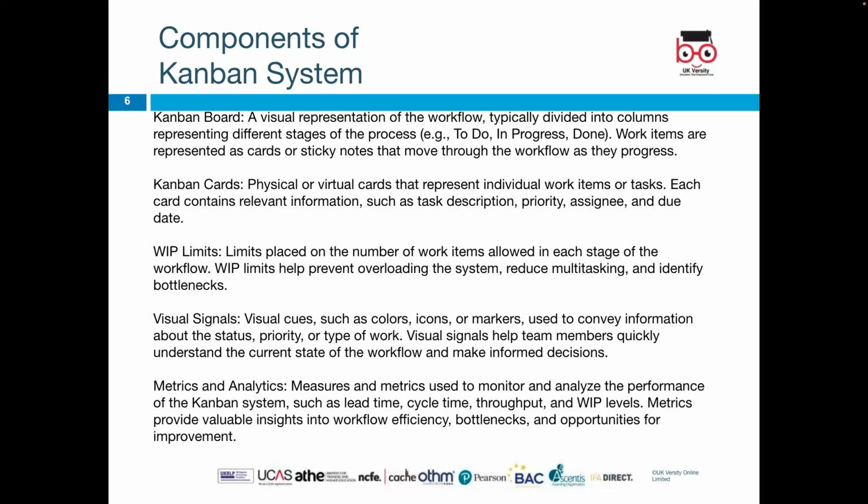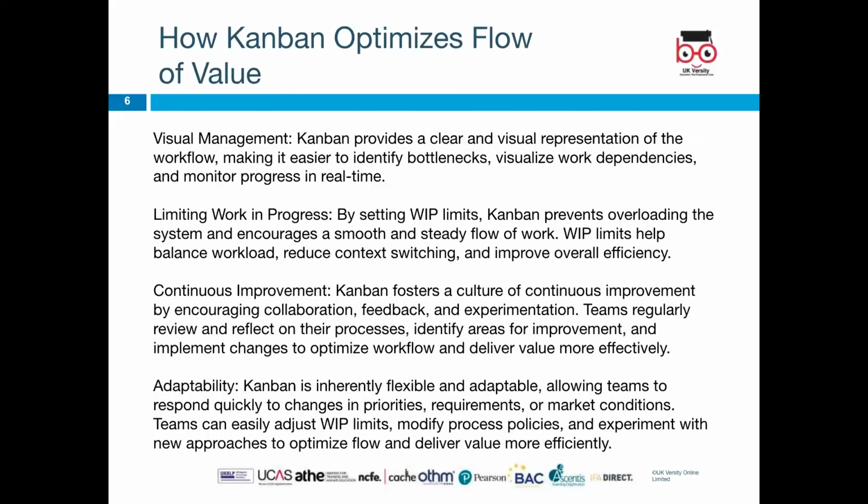Metrics and analytics, measures and metrics used to monitor and analyze the performance of the Kanban system, such as lead time, cycle time, throughput, and WIP levels. Metrics provide valuable insight to workflow efficiencies, bottlenecks, and opportunities for improvement.